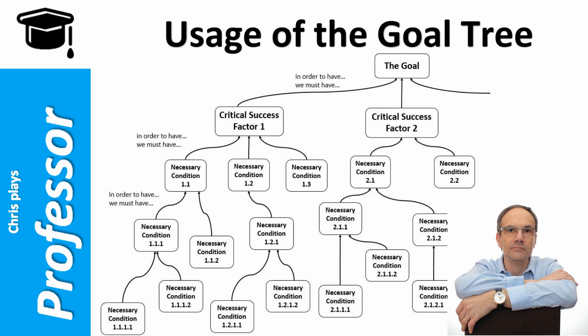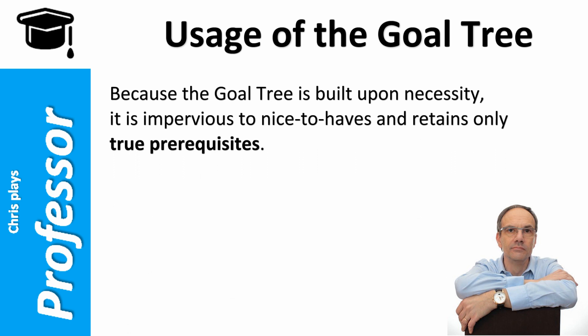The goal tree is built from the goal down to the desired level of necessary conditions with rational analysis. It is not a brainstorming exercise, but the logical analysis of what is required to achieve the succession of intermediate objectives. Because the goal tree is built upon necessity, it is impervious to nice-to-haves and retains only true prerequisites.